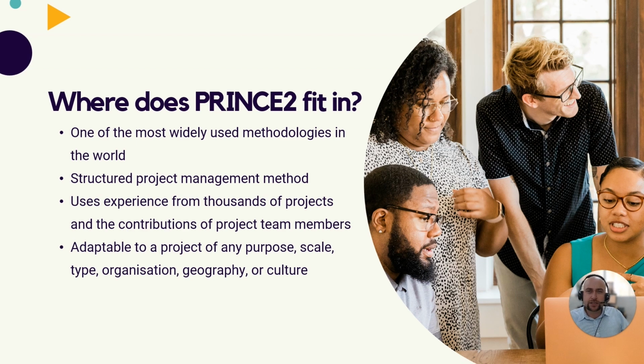Now, PRINCE2 has been designed to be adaptable so that it can be applied to any project, regardless of the project's purpose or the scale of the project or the type of the project, the organization involved, the geography, or even the culture. So how does PRINCE2 do this? Well, it achieves this by firstly separating the management of the project from the specialist development activities, such as design or construction, allowing any specialized or specialist activities to be integrated into a controlled environment for the project.